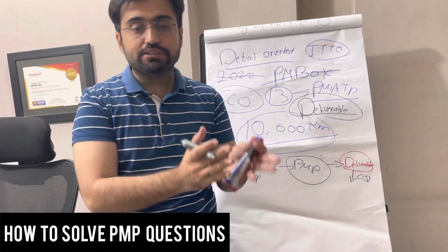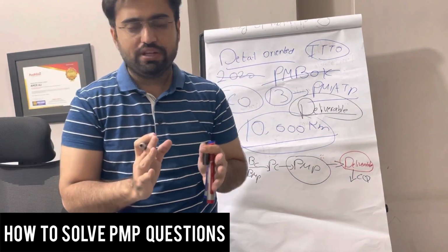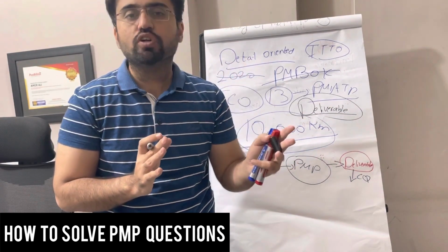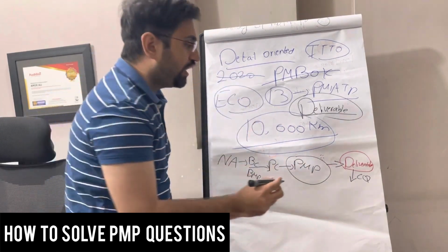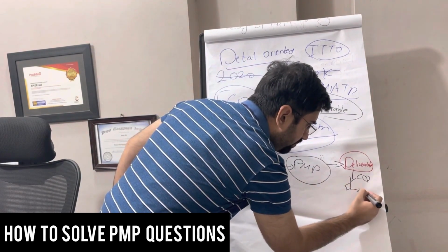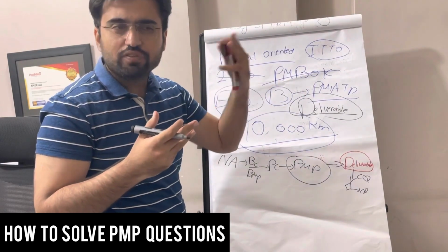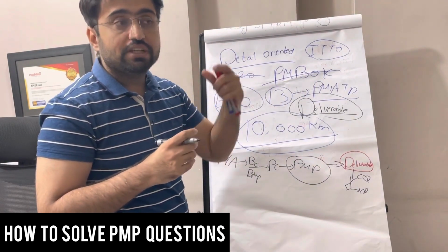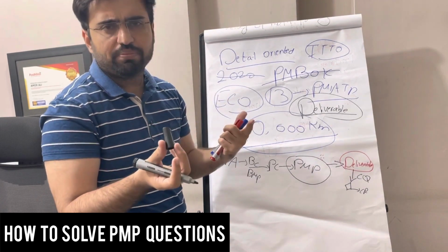Are these deliverables according to our agreed requirements or not? If the deliverables do not meet, they become a change request as a form of corrective action. Let's say here we have a diamond symbol, they don't meet, they become a change request, and go to the change control board. We already discussed the journey of change request.